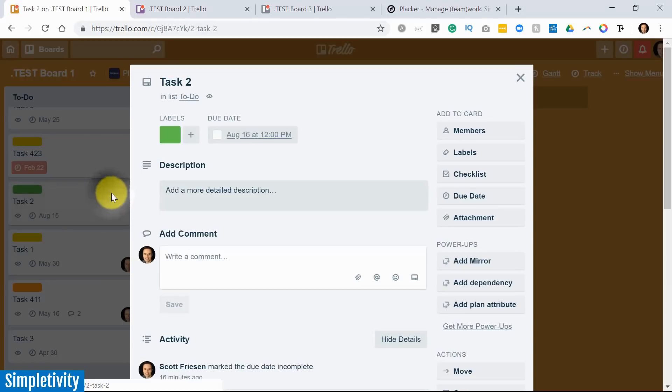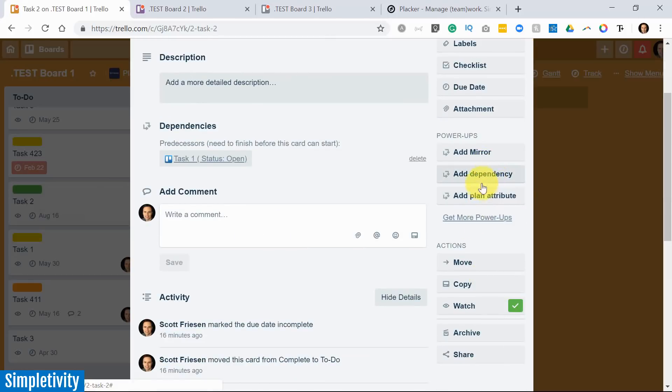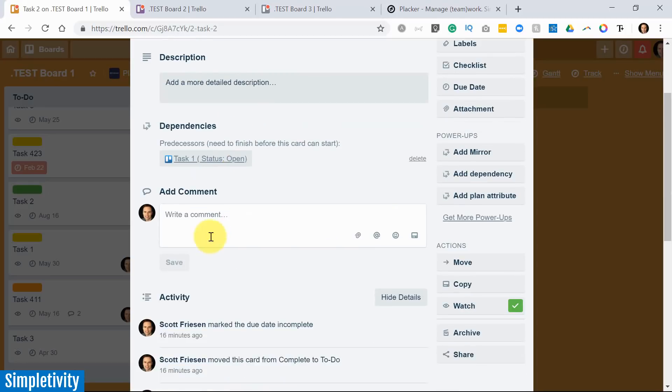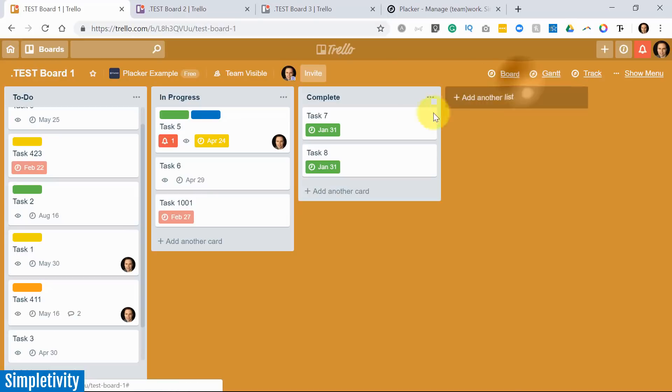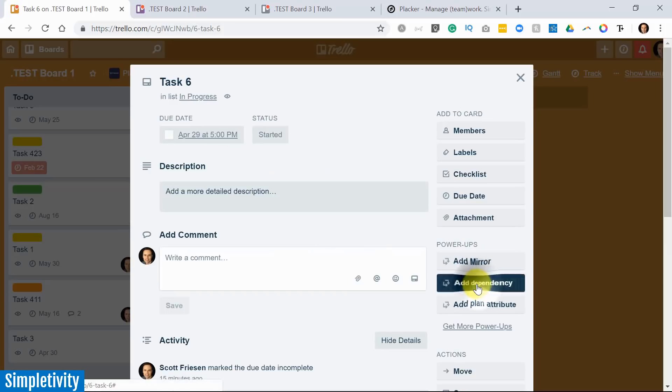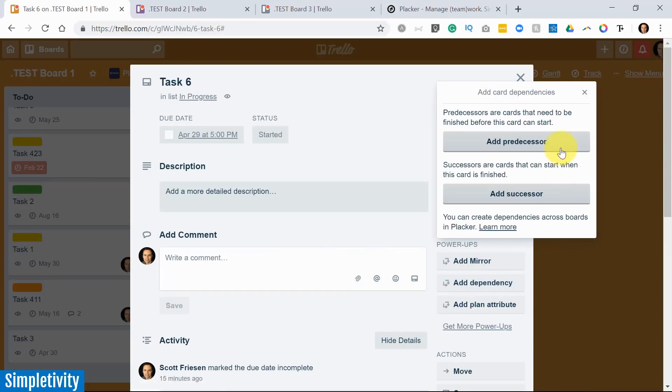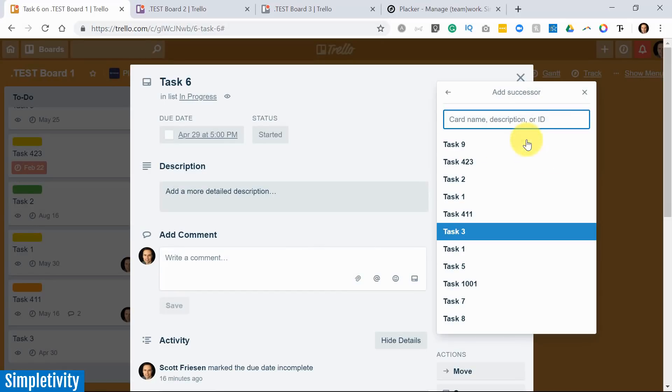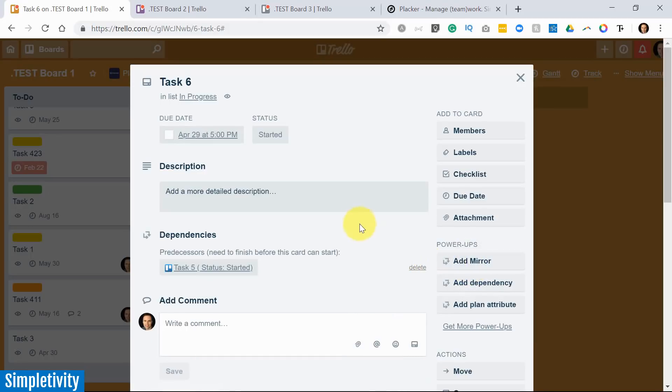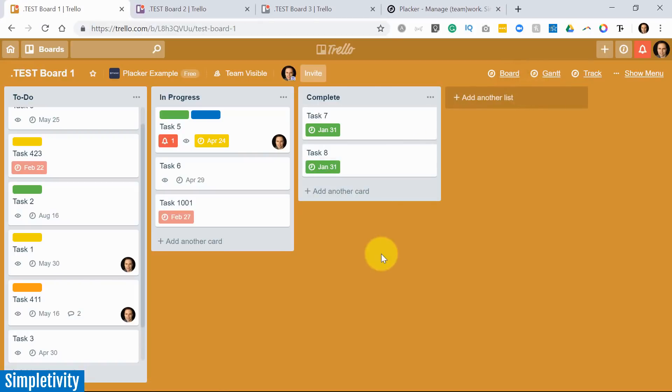The last one, which I'm not going to get into in as great of detail is the add dependency. So if you need to complete a particular card before something else, you can do so. For example, here you see that this card actually has a dependency. This needs to be finished. Task number one needs to be finished before task number two. That seems to only make sense, right? One before two. But let's go and see what that looks like on a different card. Task number six, I don't think has a dependency. So let's say I'm going to click on add a dependency. It can either be a predecessor or a successor. And let's say, well, let's add a predecessor in this case. And let's say task number five. Got to do task number five before we accomplish task number six. So you can see that here. You can see that identified here within the Trello card. It's also identified within the Placker interface as well.